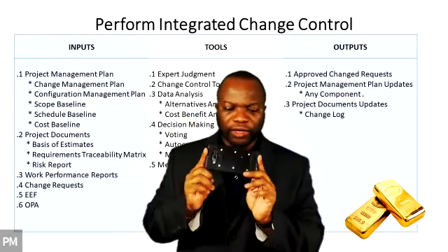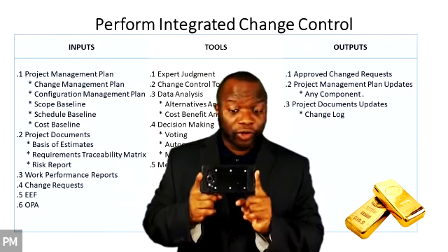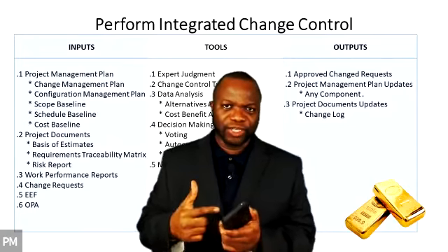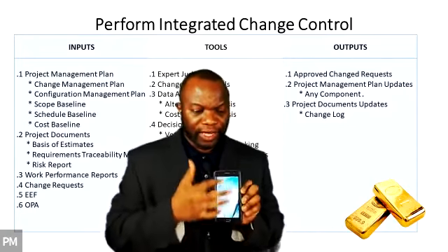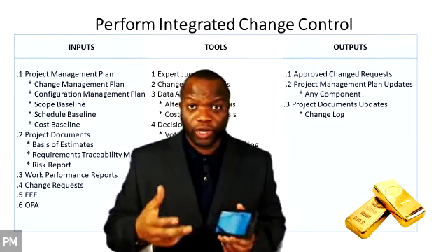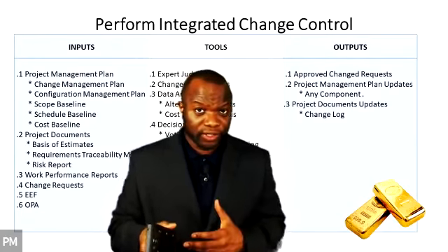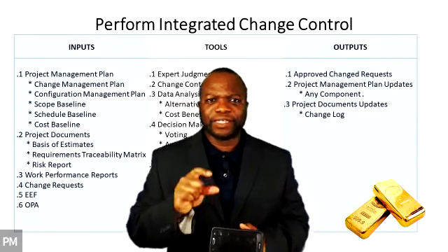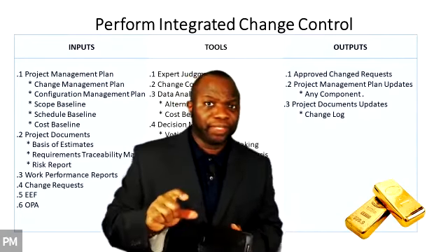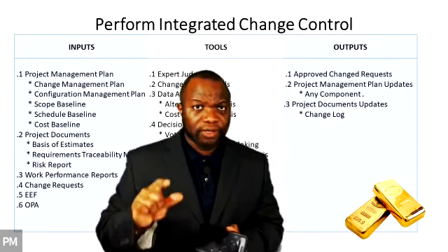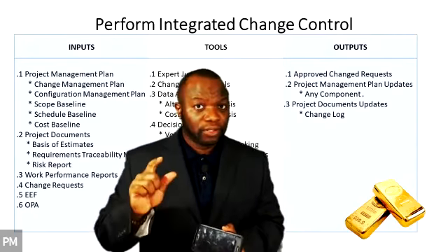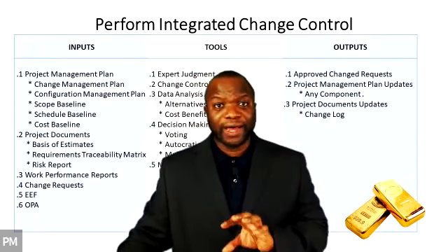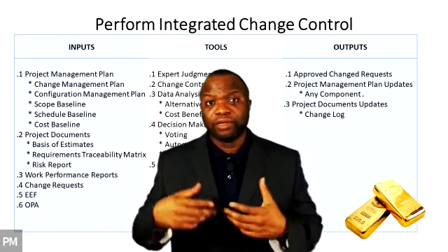We're going to take note if the dimensions have changed. We're going to record that. If the actual software on the system is changing, we're going to record that. If the interface is changing, we're going to record that and what version of the interface it is. All of these could be looked at as documented in a spec document. Updates to specs. You got to remember it's specs. And then parts of configuration items could also be things like your WBS.